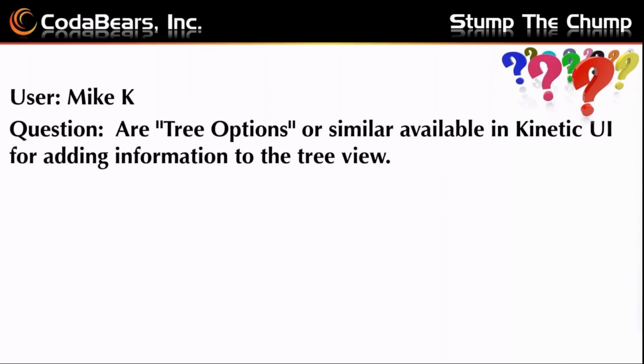Thank you. From Shahan, I was curious, can a regular manufacturing job be dependent on a project job? If changes are made to the project job, can it trigger the rescheduling of the manufacturing job? I would think only if the manufacturing job was made from the project job. If you just created the job like to stock or even make to order wouldn't work, but if you were just making the production job for the component to stock, that's not linking the project to the inventory job.